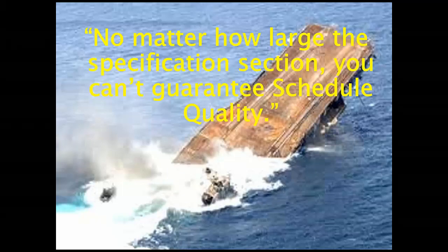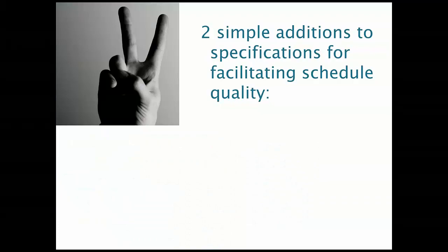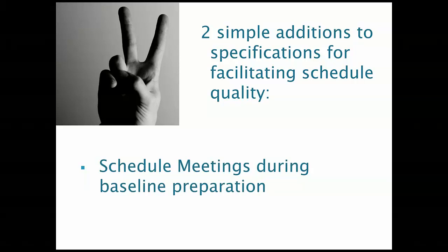And so there are some approaches that we're going to talk about you can take to address some of those up front. And here are a couple of basic how-tos on getting some good cooperation, and one of the best steps that I know for getting a good quality schedule. The first is in the process of organizing a project, putting the project team together, having the initial project meetings, start delving into the schedule with both parties there.